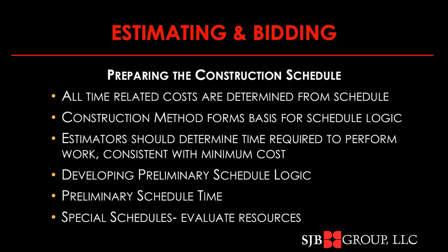The next two points you're going to develop are essentially the preliminary schedule logic in conjunction with developing the preliminary schedule time. Logic is the sequence, time is how long the individual parts of the work are. They work together in a construction schedule. And you may also have to do some special schedules.